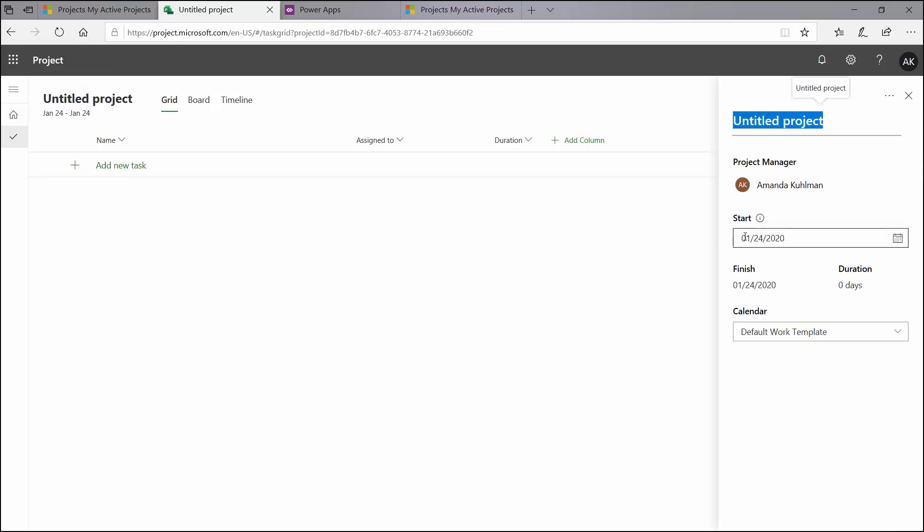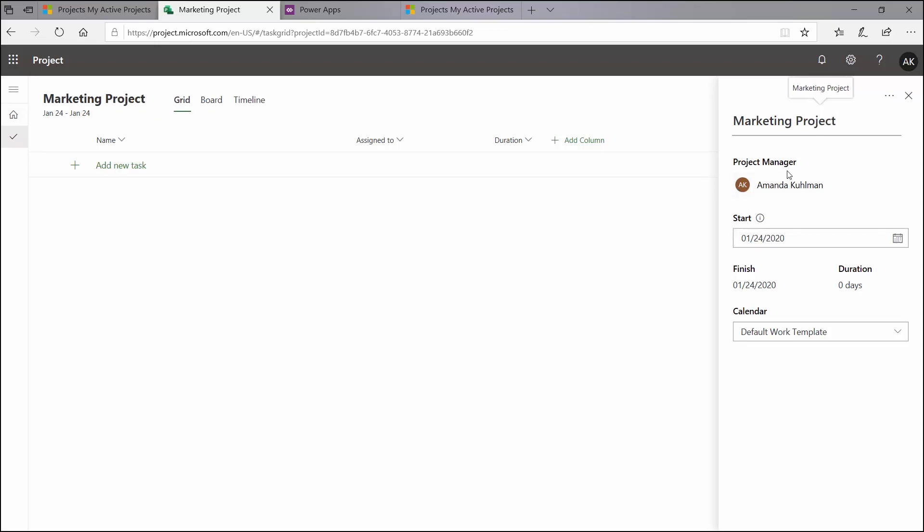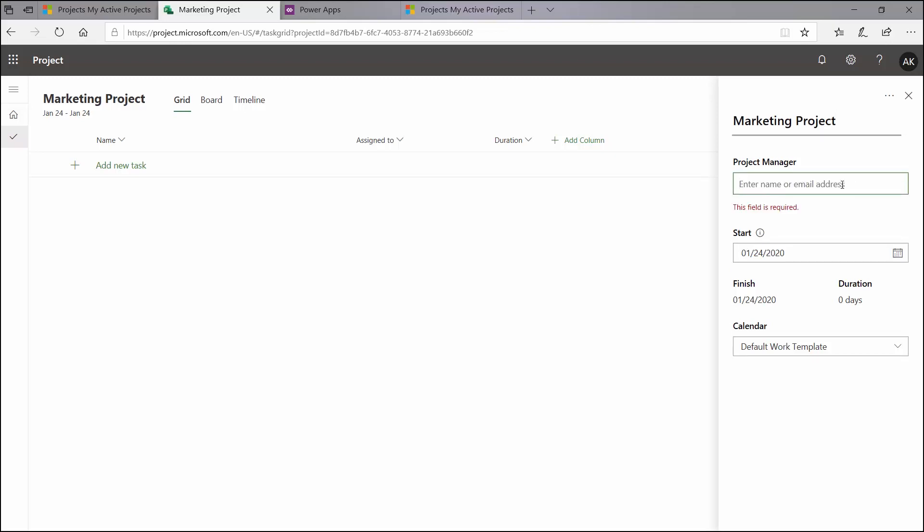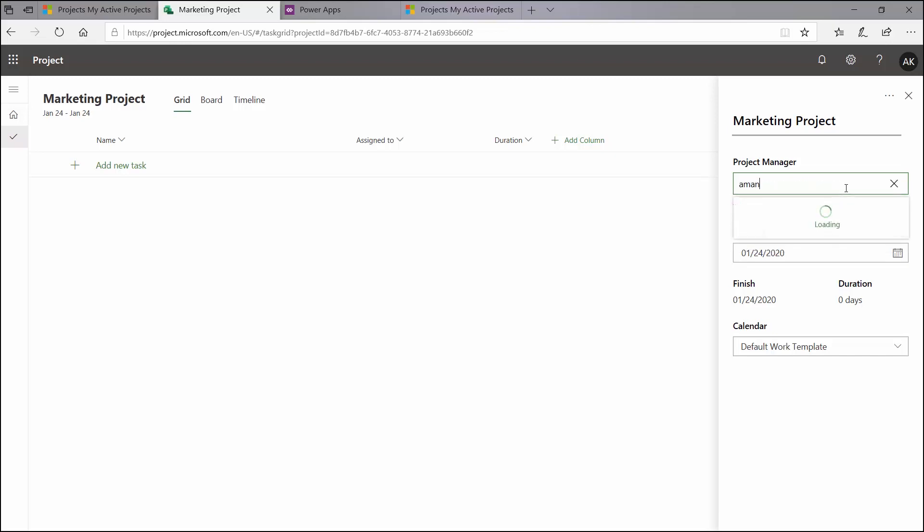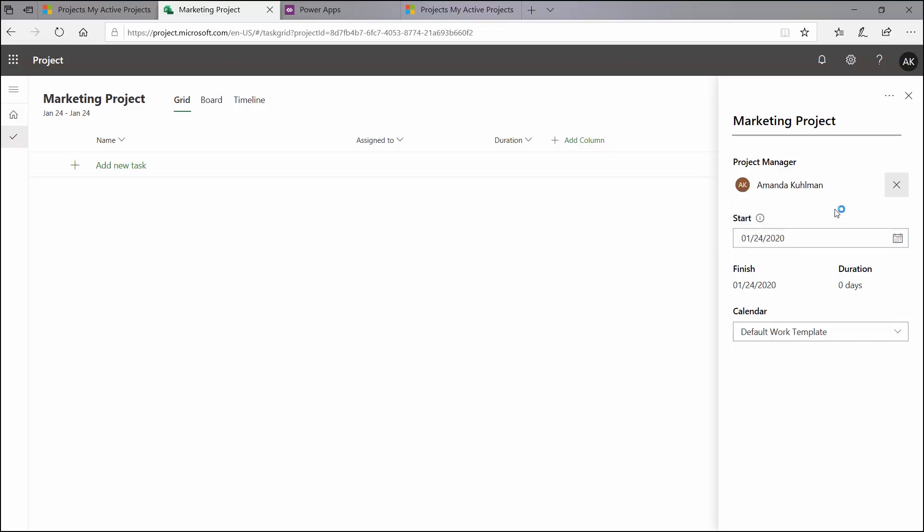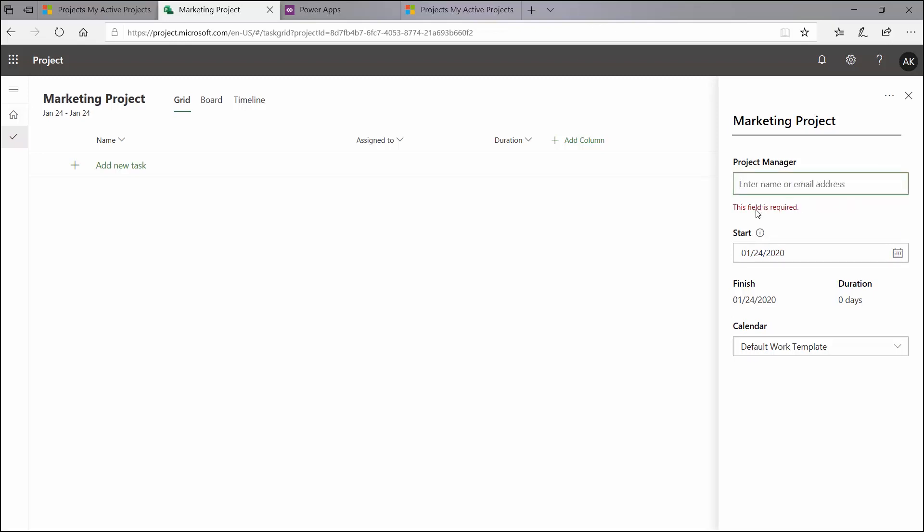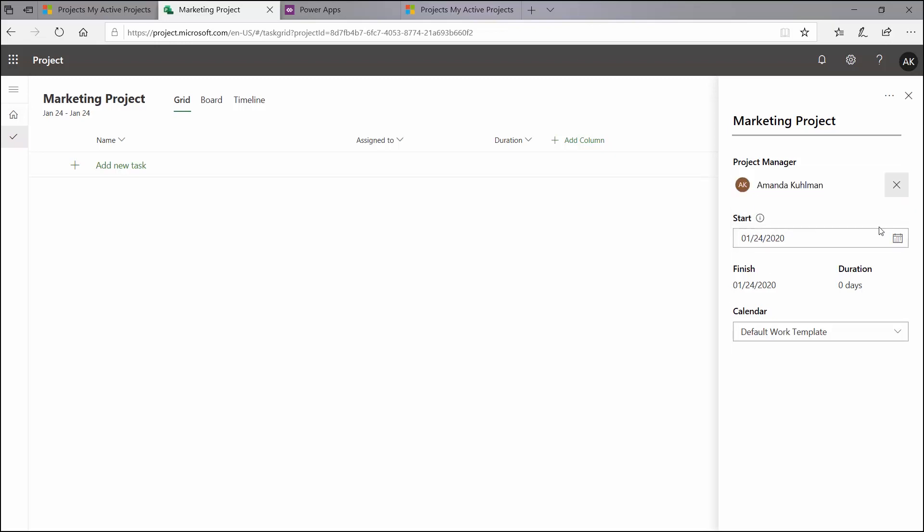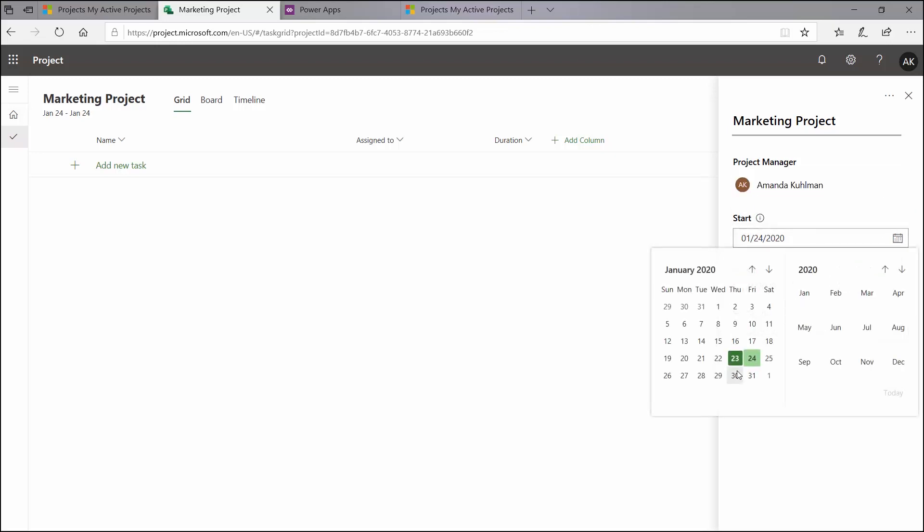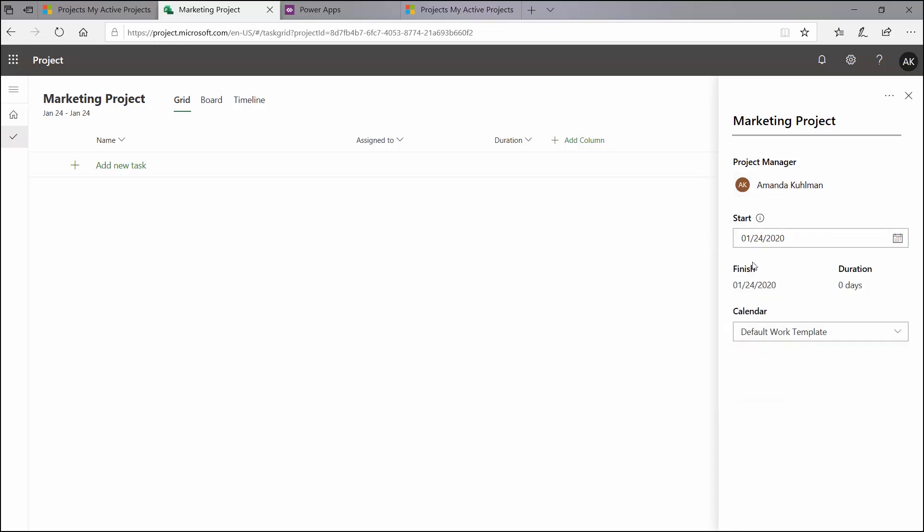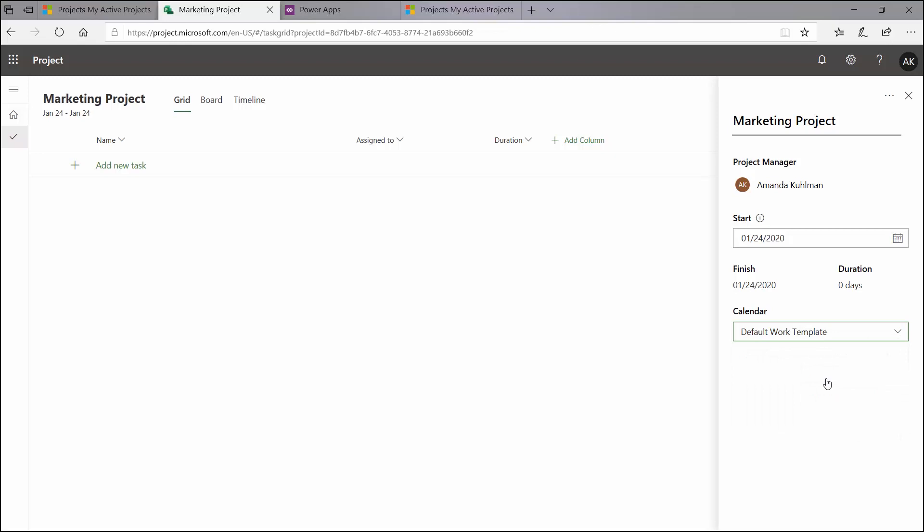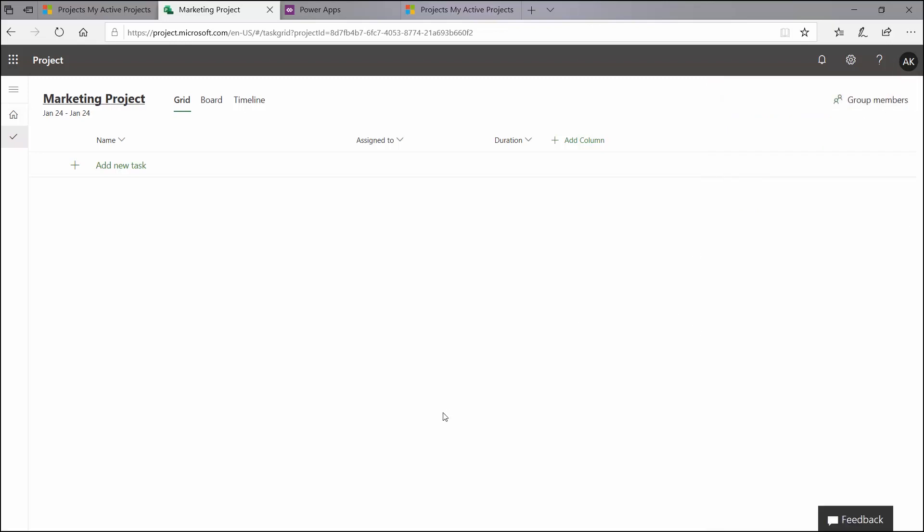So I'm going to go ahead and click on my untitled project. I'm going to name this Marketing Project. Here is where I can list the Project Manager. By default, it is me, since I'm the one who created this project. I can add in somebody else if I would like to, but I'm going to leave this to be myself. But this is a required field. It does need to be somebody here that is listed. Here is where I can list my start date. The start date is not today. I can say that it is going to be sometime in the future. And here is where you can see these are automatically calculated from the plan. I can see the finish dates, and I can see the duration for my schedule. And here is where I can define what calendar I want to have applied to it. I just use the default for right now.